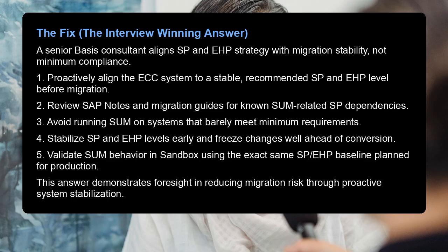The fix, the interview-winning answer. A senior basis consultant aligns SP and EHP strategy with migration stability, not minimum compliance. 1. Proactively align the ECC system to a stable, recommended SP and EHP level before migration. 2. Review SAP notes and migration guides for known SUM-related SP dependencies.